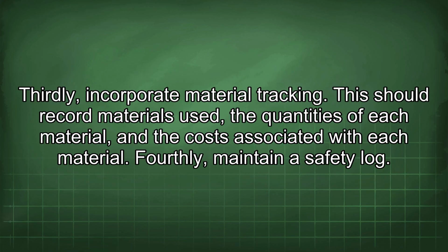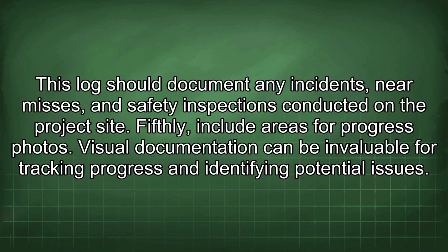Thirdly, incorporate material tracking. This should record materials used, the quantities of each material, and the cost associated with each material. Fourthly, maintain a safety log. This log should document any incidents, near misses, and safety inspections conducted on the project site.